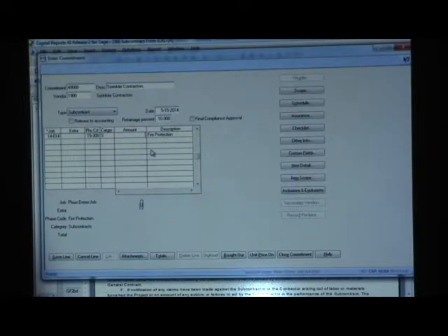Generally it's a lump sum, but when you're in an outage situation, which is the pass-through bill plus 10%, then we would put a T&M, and it would just pass through me, and I'd mark it up. But they're still going to give you a not-to-exceed price. But in our time contracts, except outages, I don't typically get not-to-exceeds in outages for a sub.